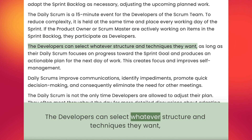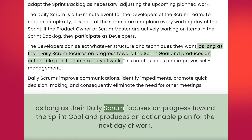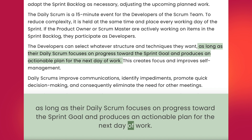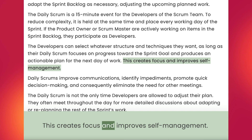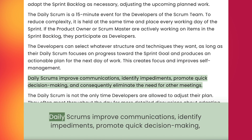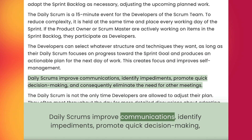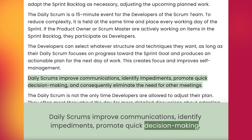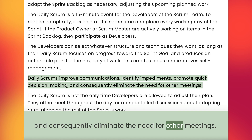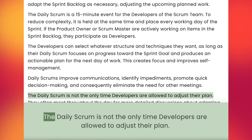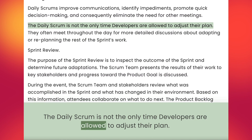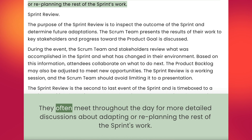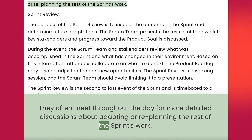The developers can select whatever structure and techniques they want, as long as their daily scrum focuses on progress toward the sprint goal and produces an actionable plan for the next day of work. This creates focus and improves self-management. Daily scrums improve communications, identify impediments, promote quick decision-making, and consequently eliminate the need for other meetings. The daily scrum is not the only time developers are allowed to adjust their plan; they often meet throughout the day for more detailed discussions about adapting or re-planning the rest of the sprint's work.